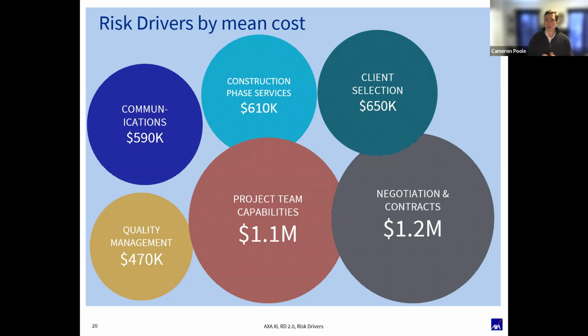There's some projects you can't even take on without a waiver of consequential damages. So, you know, you think about the Wynn Casino that just went up in Everett, right? What are the consequential damages every day that that casino doesn't open on time? What's the revenue they would make? It's millions of dollars. You put an architecture firm out of business quickly taking on those damages.